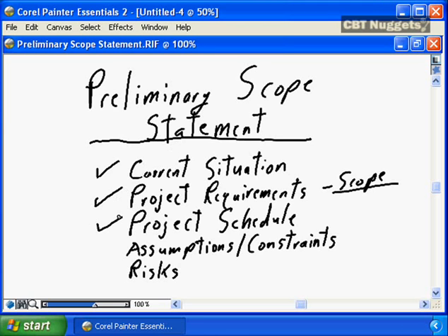Based on experience in my organization, a project of this magnitude would take 3 months in analysis, 6 months in design, 10 months in development. Based on my experience, or based on industry experience, or based on estimating parameters I have gotten from the internet, or from trade periodicals, that's your project manager's toolbox, you're going to develop the preliminary project schedule that says phase 1, 6 months.